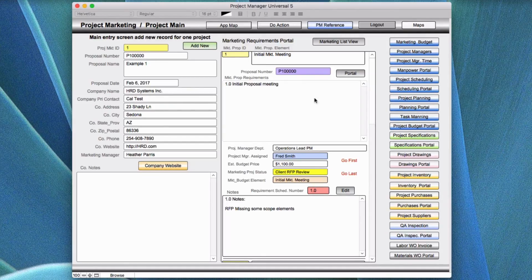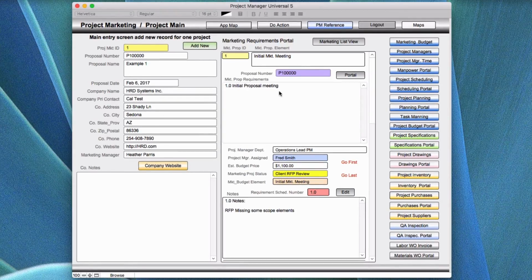The good part of this is if you have a structure for WBS and you've created it before, you can go back and look at another project, say like I'm in project 24 and I want to go back and look at one because it's very similar. I can compare all the budgetary numbers and the structure of the WBS and all the work I did in preparation for that particular project and make sure that I have a close match or something that provides the data that's required in order to do this proposal.